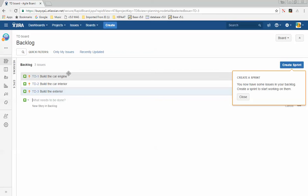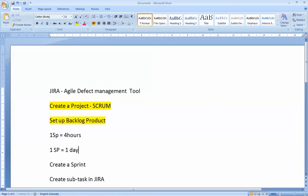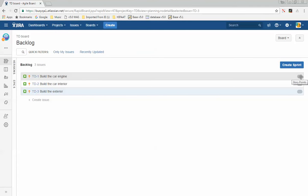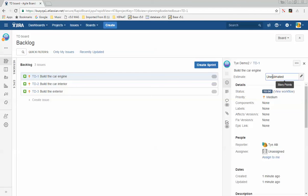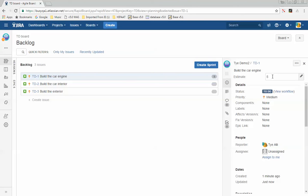Every team has one story point as a reference point — it could mean four hours on one team, or one day on another. The CSM on your team will help define what one story point means. The team will then vote using a planning poker card and assign a story point to each story. Click on the story and where it says Estimate, assign the story point.